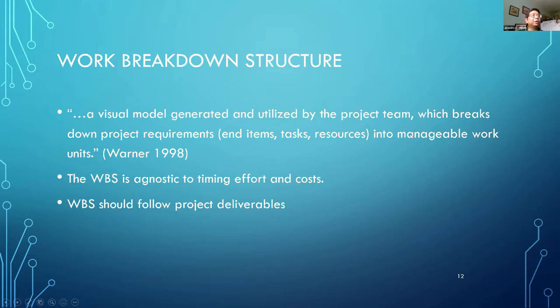You have to also remember that the work breakdown structure is agnostic, meaning it's not dependent to time and costs. So your main objective lang is to break it down into manageable workloads. Okay? So if you're looking at creating a house, and that is your whole project, you have to break down, okay, I will create the house, the components would be the foundation, then the frame, then the interior, then the plumbing, okay? But if you say foundation, that foundation can still be broken down. If you say the frame, that can still be broken down, okay?